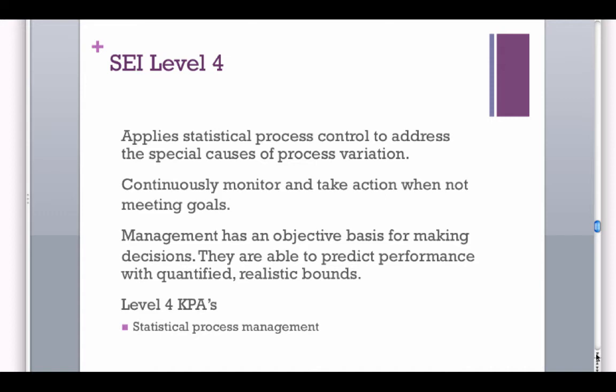If you measure all of these for a long period of time, the team is so mature that if there's anything outside the norm, then they have to have a good reason. They have to explain, well, why is that? Why in the last month did we find a fewer number of faults per 1,000 lines of code? The answer might be, well, a lot of this code was rework, meaning we had already had a code review and we identified many things, and the author rewrote the code from scratch, and they now knew what to look for. Okay, so that might be an answer.